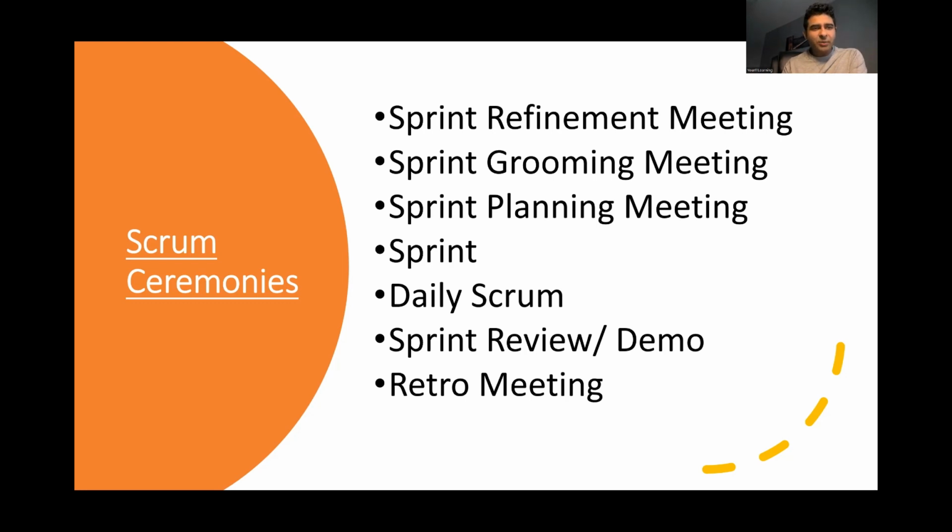In any scrum team, once the sprint starts, the developers don't like any new work to be brought in. Every new user story has to be brought to refinement, grooming, planning, and then it comes to the sprint. But take an example: if I'm a new BA, and I brought in a very small user story, I know it was one user story point, and I brought it straight away into the sprint. So when the sprint retro meeting starts, every developer will say, stop doing this. So they will tell me.